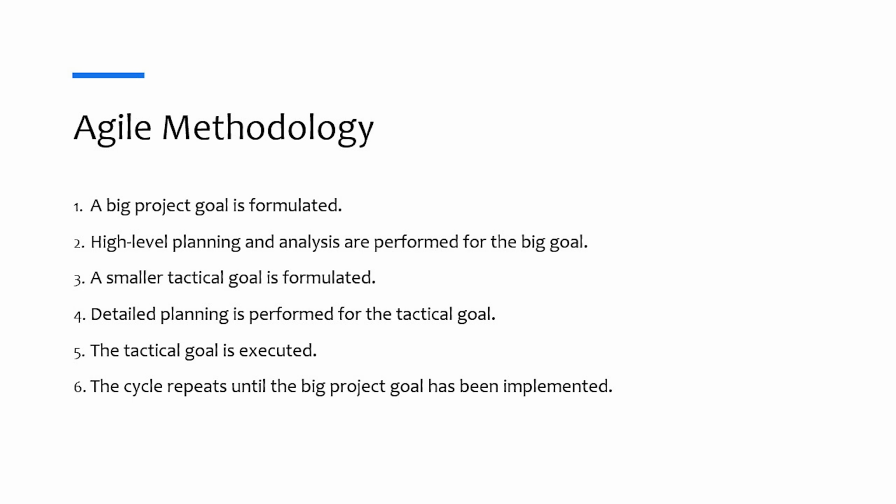The main advantages of Agile approach are breaking down detailed planning into phases as opposed to a single planning session before the project begins, which saves time in the beginning of the project and creates flexibility later on because requirements are changed pretty frequently during the project execution. And also, planning and delivery of technical goals enable project stakeholders to receive continuous feedback from users and adjust the project requirements and estimates on the fly.